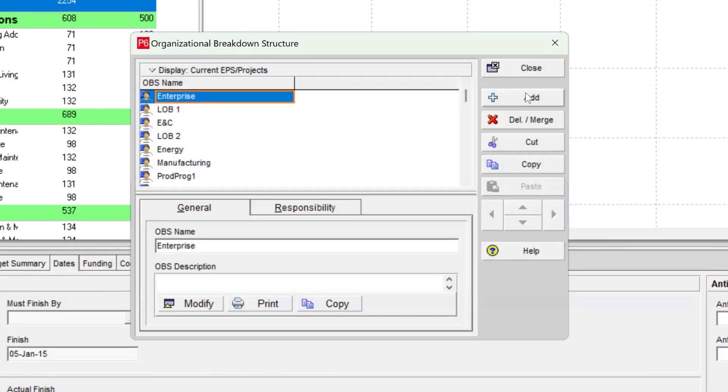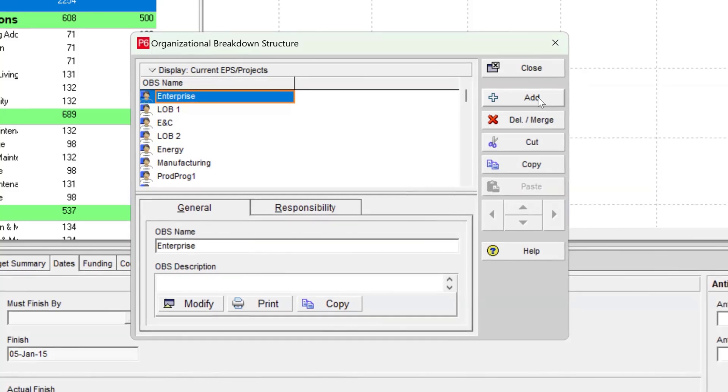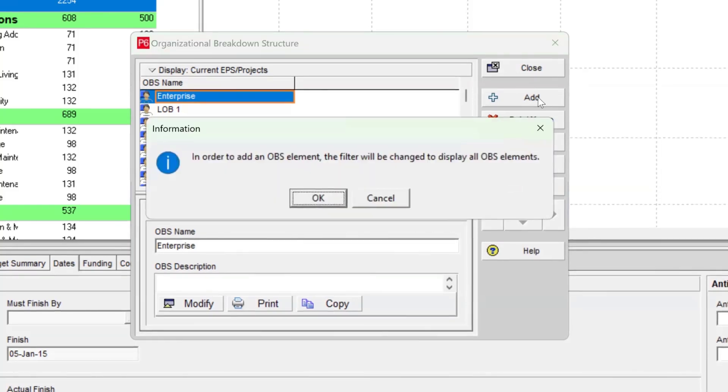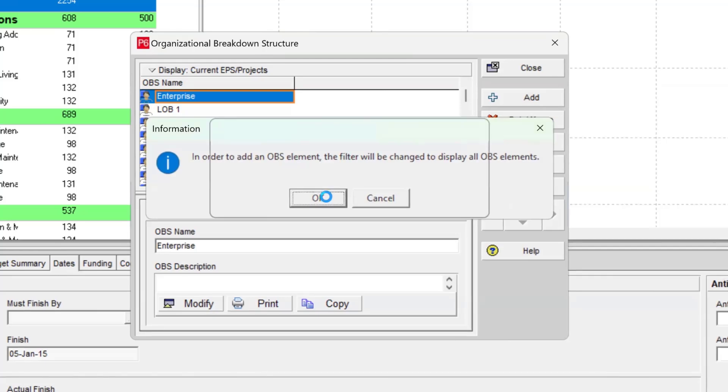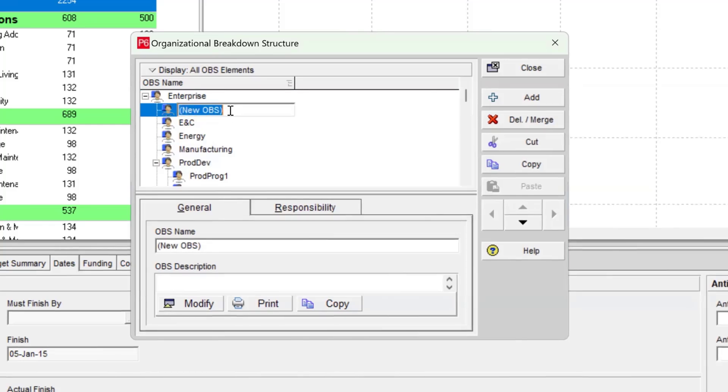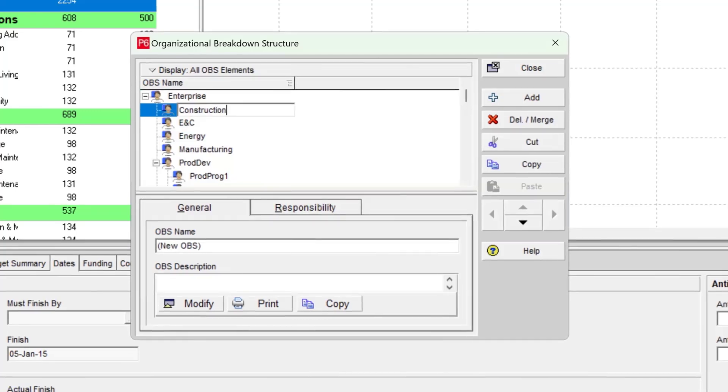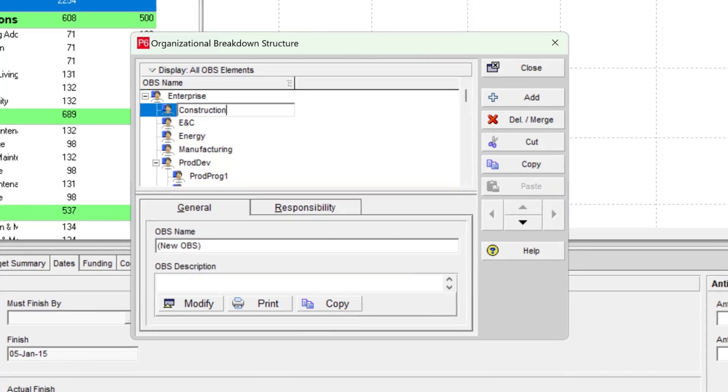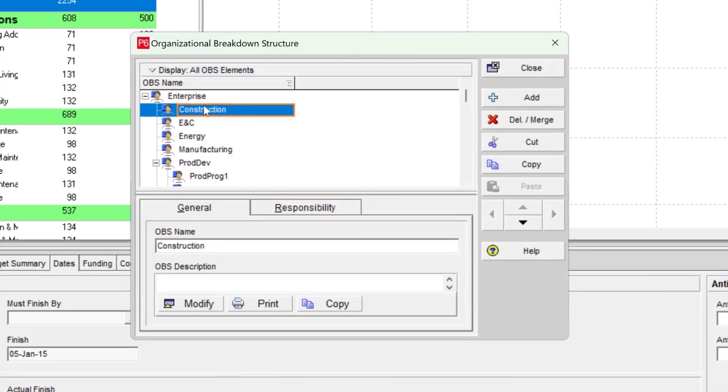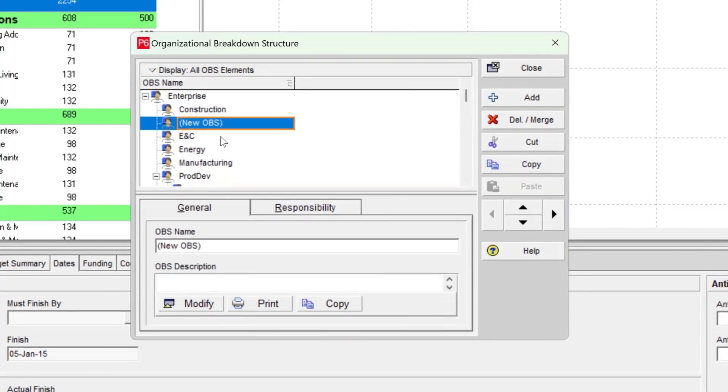So to add your OBS, all you simply need to do is click on the add button here by the right hand side of the organizational breakdown structure window. So I simply click on it and whatever pops up, you just click on OK. Once you do that, it's going to create a portion titled new OBS. So you type in your new OBS, which in this case is construction based on what we have within the brief. And then we're also told that the next OBS is the project manager. So once you've typed in construction, just hit enter in your keyboard and then also click on the add button again.